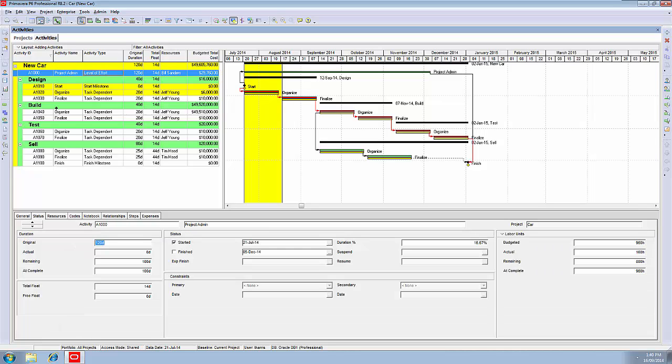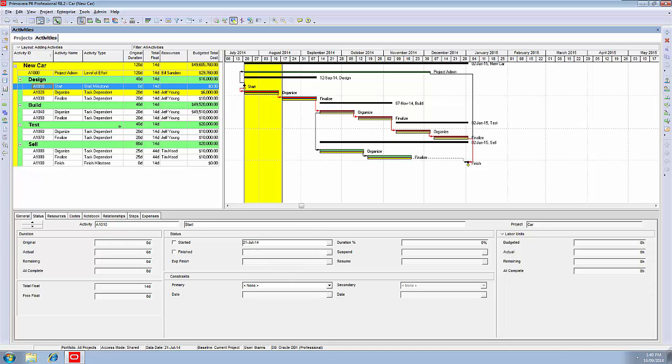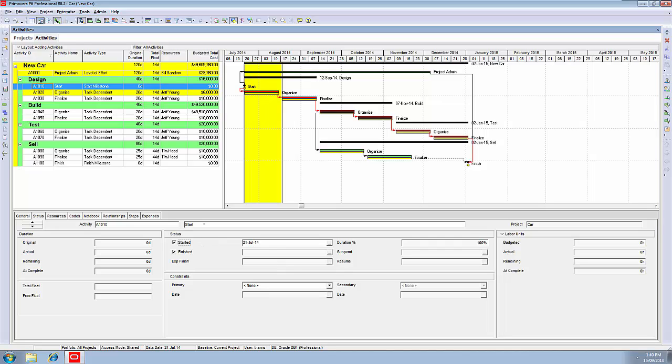We come back to status, and on to the next activity, which in this case is 1010, which is a milestone - you can see from the Gantt chart there, it's a diamond. We need to be told, did it start? Did the project start on the 21st? Yes, it did, so tick. Notice the computer ticks finished automatically. It's a milestone, there is no duration. As soon as it starts, it finishes. And the computer knows that. That's all you do with a milestone. There are no resource hours on a milestone, and usually you don't put expenses on a milestone.